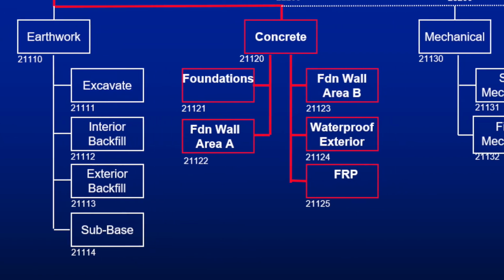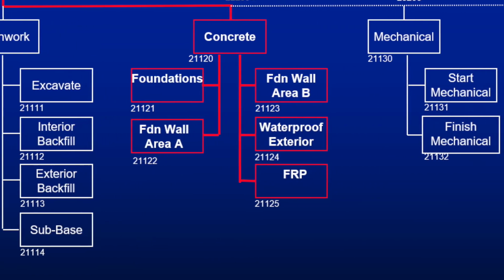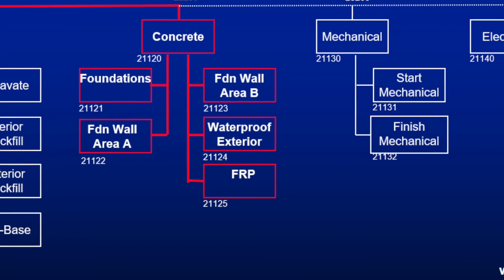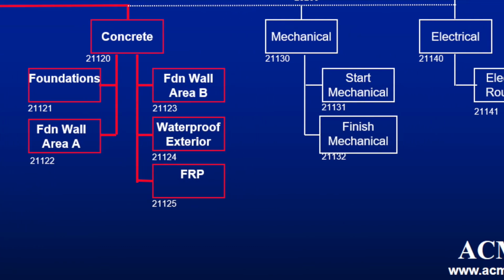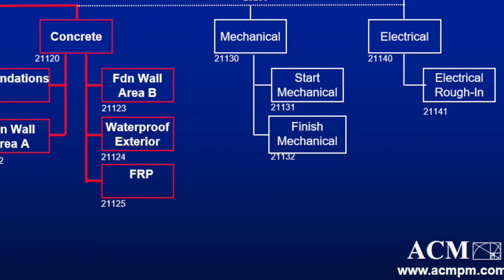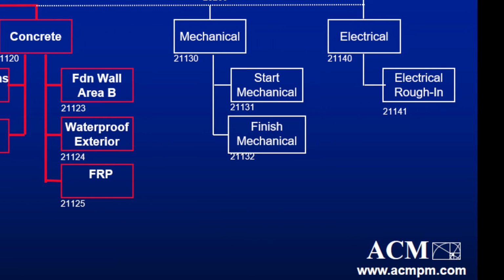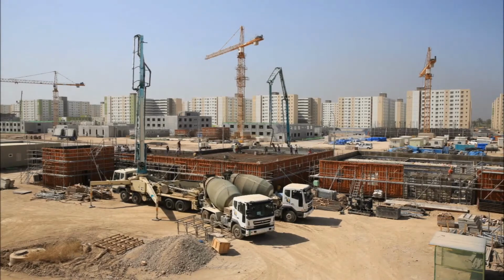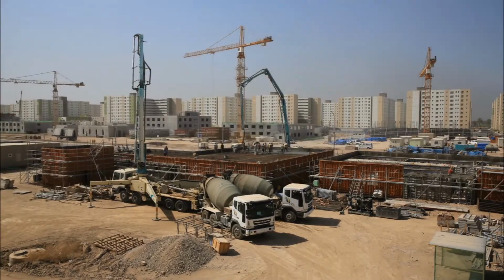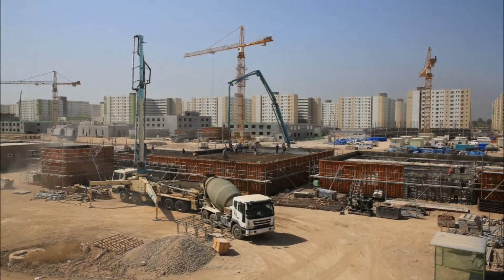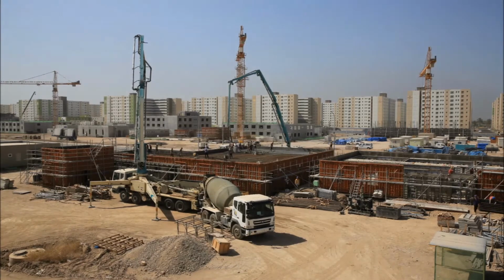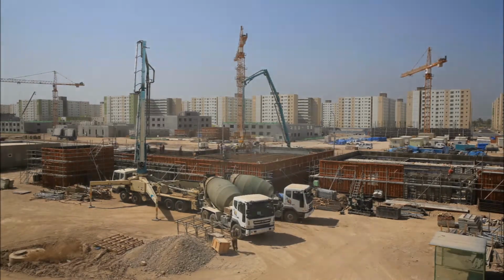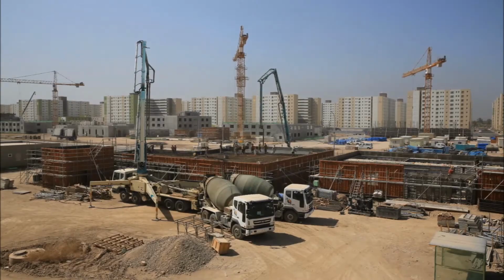You don't want the work packages to be too detailed or not detailed enough. In order to do this, it's important to realize the WBS's focus is on work deliverables. It should not be broken down into phases or a general list of tasks. Depending on the project, the work package doesn't always have to be a specific task. The last level should all be mutually exclusive from each other and be detailed enough to be a work package you can schedule, budget, and hand off to the team leader.